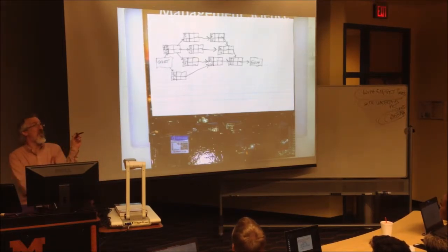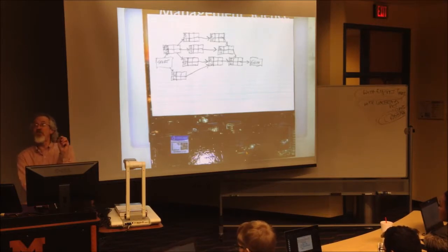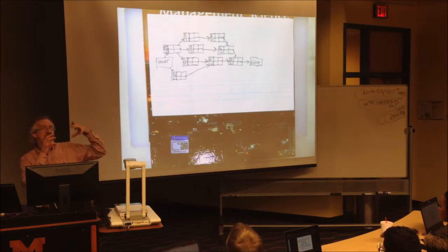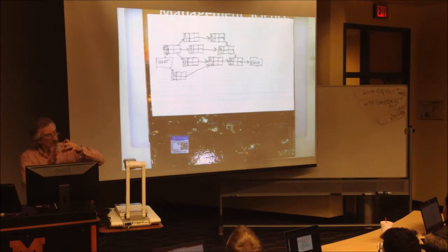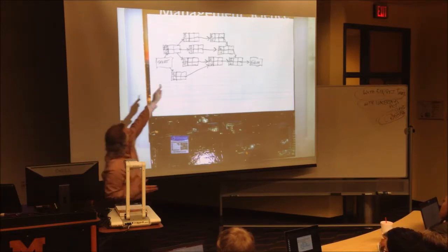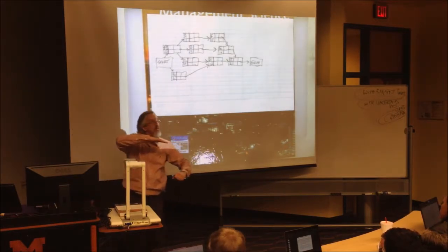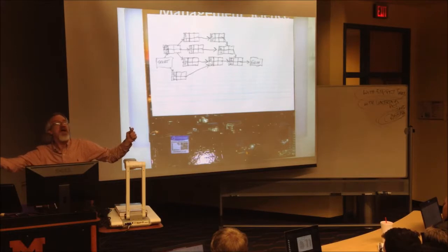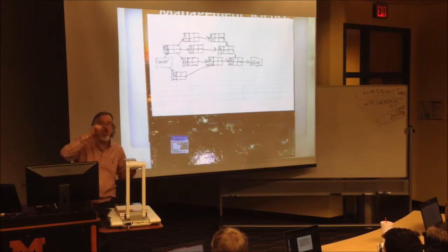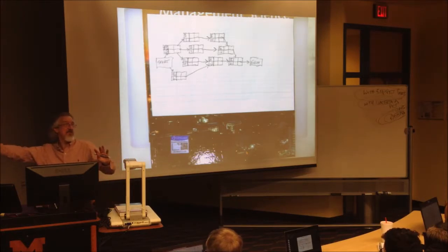You're about to learn what's called a forward pass and a backward pass. The only part that's tricky about a forward pass and a backward pass is when you have more than one activity preceding the activity you're trying to figure out the time part, when it should start and end. The top boxes are your forward pass for each activity. The bottom boxes are your backward pass. The forward pass is to figure out how much time this whole project is going to take. The backward pass is to figure out which activities are your critical activities and which activities have what's called slack, where there's time, they don't have to start right away, and they won't affect the time of the project.